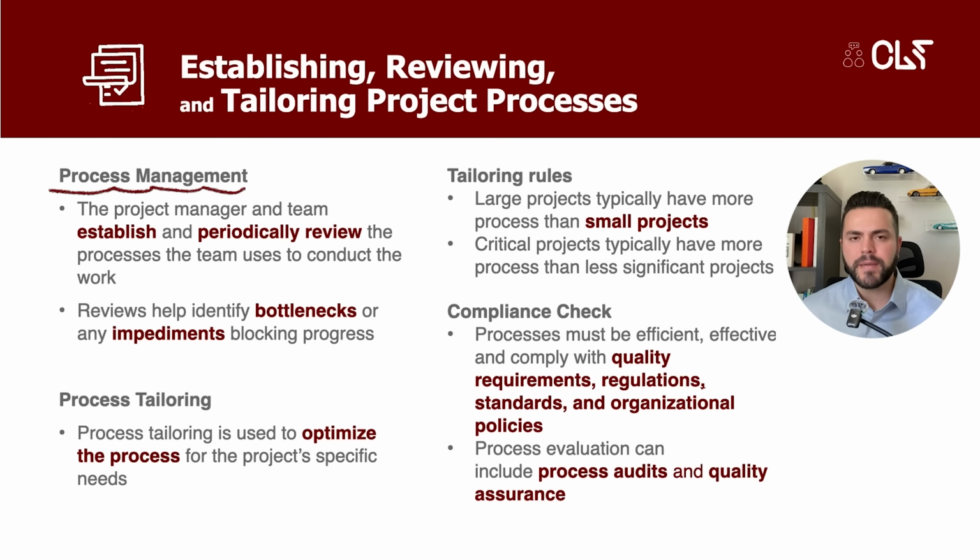Now let's talk about process management, which is a very important part of any project work. The project manager and the team must first establish the processes. Then they need to periodically review the processes that the team uses to conduct the work. This regular review process is essential because these reviews help to identify bottlenecks or any impediments that might block progress. We also utilize process tailoring. Tailoring means optimizing the process particularly for the needs of the current project. We have general guidelines for tailoring, which are often based on complexity or criticality of the project.